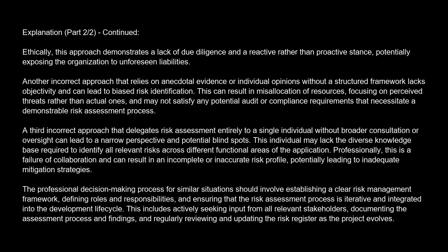to inadequate mitigation strategies. The professional decision-making process for similar situations should involve establishing a clear risk management framework, defining roles and responsibilities, and ensuring that the risk assessment process is iterative and integrated into the development lifecycle. This includes actively seeking input from all relevant stakeholders, documenting the assessment process and findings, and regularly reviewing and updating the risk register as the project evolves.